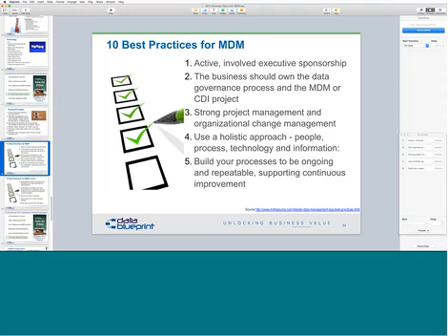So a separate goal is implement the MDM technologically. However, if you implement the MDM technologically without doing data quality, you've got a great solution, but it's not going to help overall because now you've taken all of your data that is of unknown quality and put it in one place. Okay, it'll be easier to clean, but it won't help.